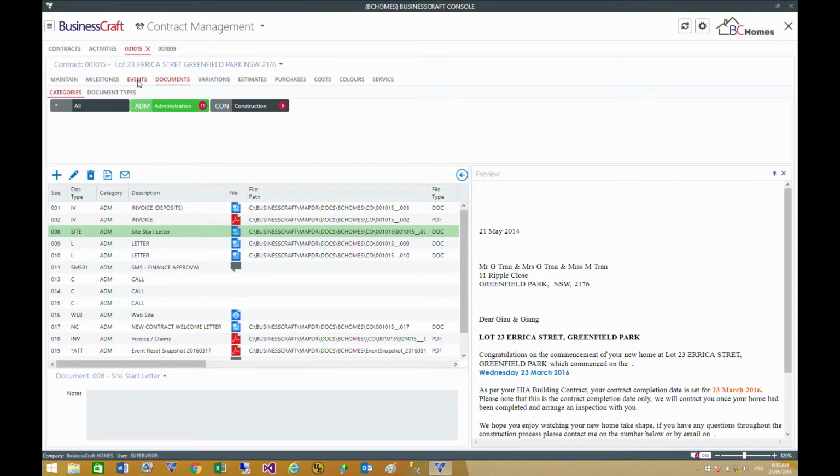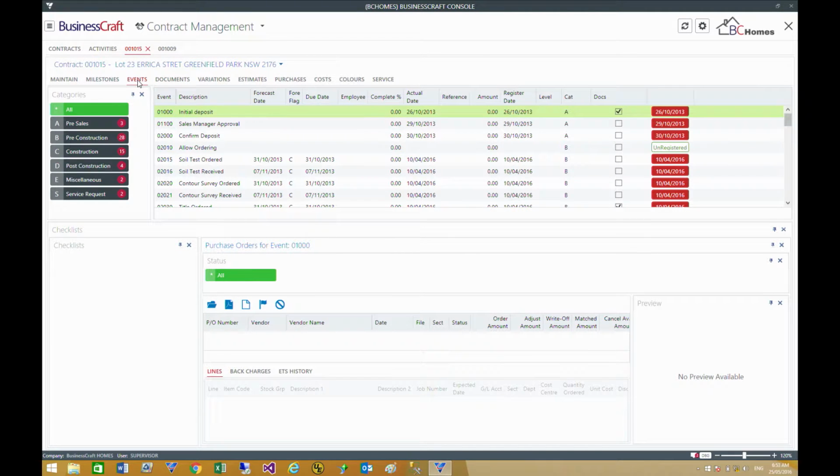I mentioned that we have a workflow system. So what the workflow does is all the stages and the tasks that need to be performed in building a house, and there's probably 300 or 400 of them that need to be ticked off in order to make sure that you build the house that the client was actually wanting. In Australia, we do custom house building, so each client can design their house totally different to everyone else's. So they might start with a standard design and then they'll have variations to that.